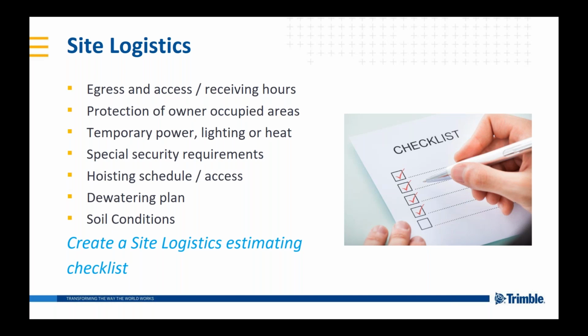So you need to make sure that you account for that in your bid process. Temporary power, lighting, or heat, who's responsible for that? And that is absolutely going to impact your labor hours. Security requirements to get onto the site. Is there anything special or is it just walk on?